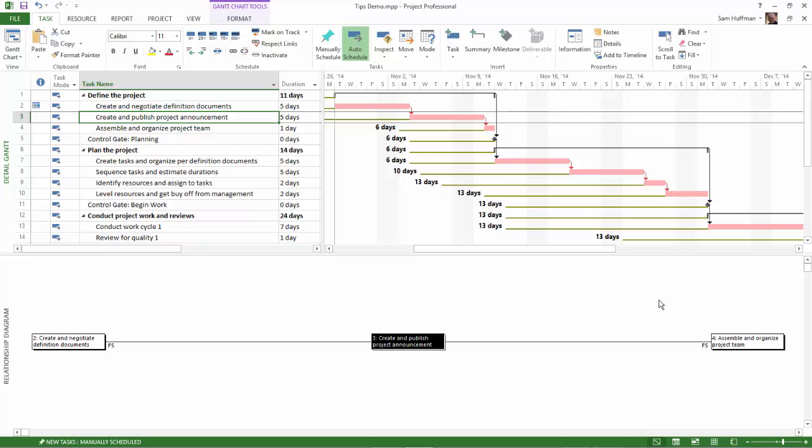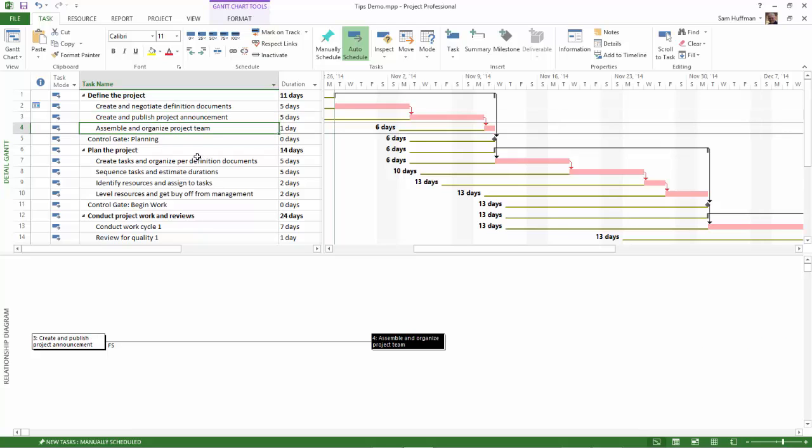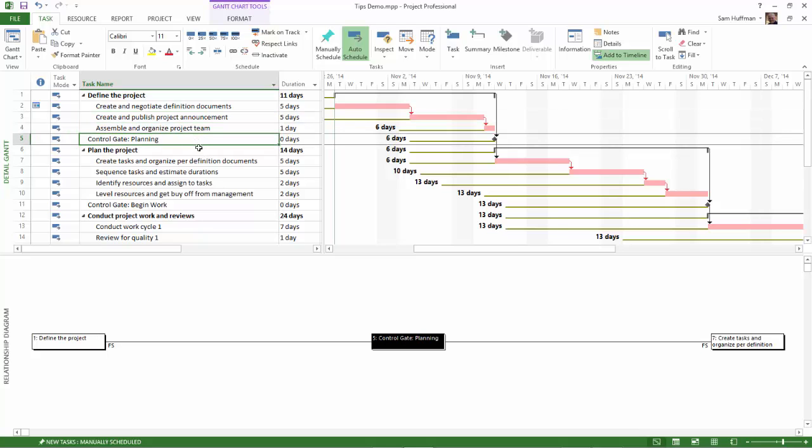You use this view by selecting tasks, doing the analysis in the bottom pane. Once you've edited or changed, made sure your sequencing is correct, go to the next task, and then the next task, until you're done with your task list.